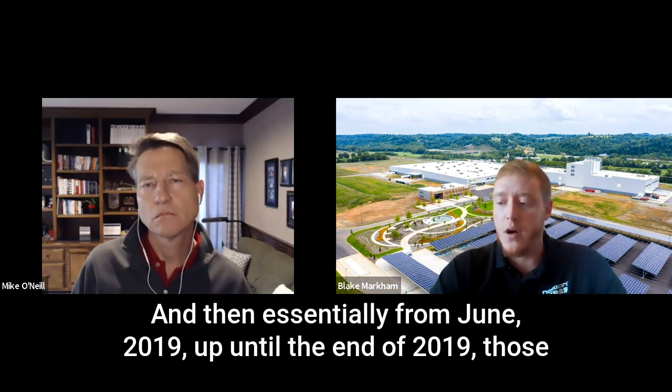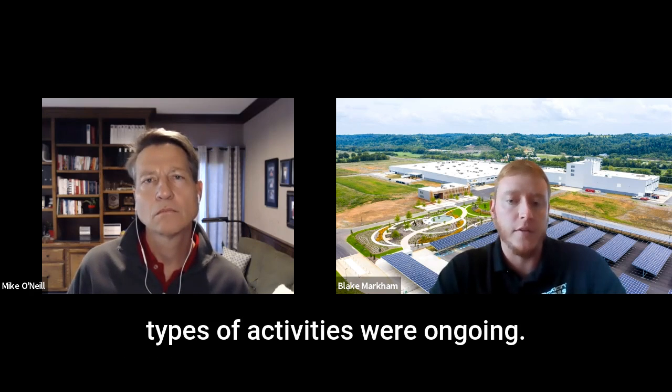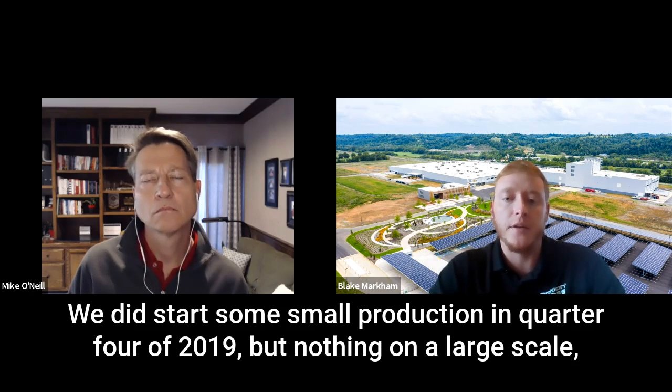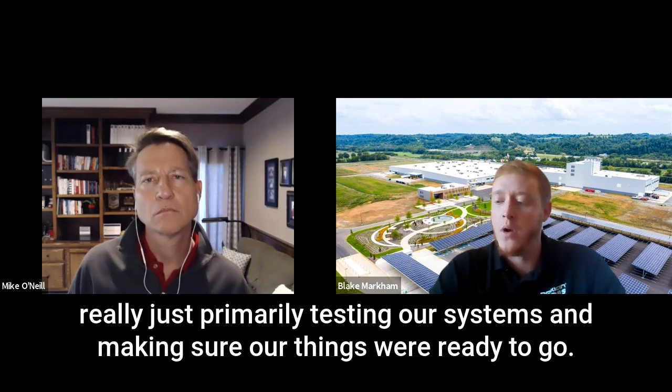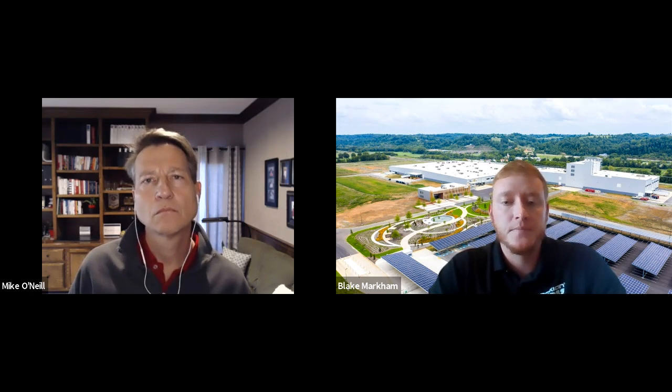Then essentially from June 2019 up until the end of 2019, those types of activities were ongoing. We did start some small production in Q4 of 2019, but nothing on a large scale, really just primarily testing our systems and making sure things were ready to go. And then we actually started commercial production at the beginning of this year.